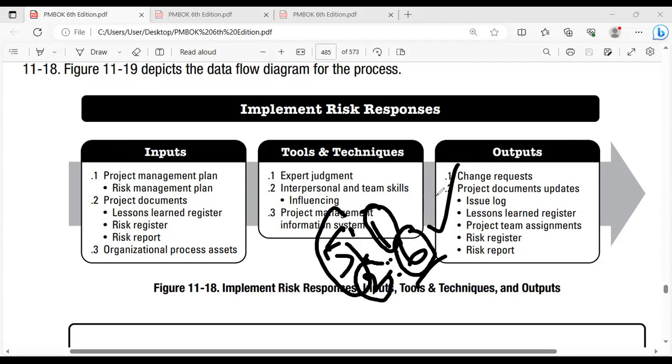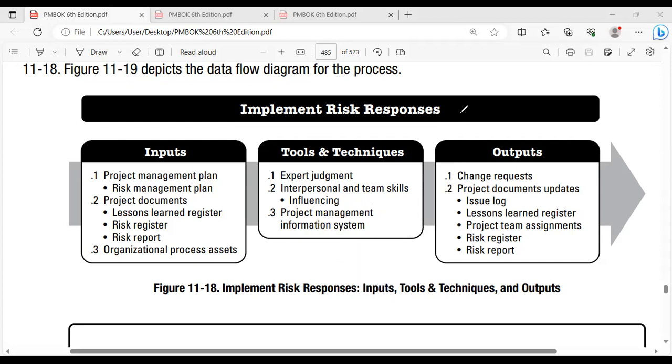Correct. Okay. So cost-benefit analysis, alternative analysis, and the multi-criteria decision analysis or prioritization matrix will help you to evaluate various risk responses, and the response will be selected and approved, and you are able to bring that into the risk register, right? And this is the place where you are going to implement the responses.